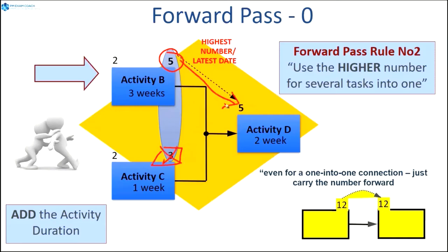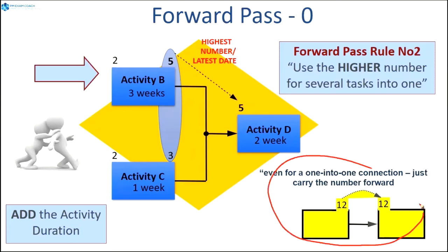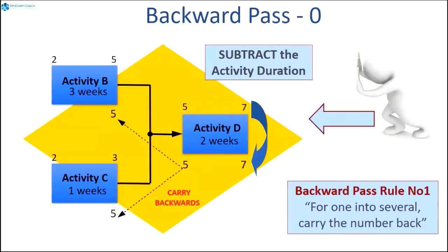And we're going to feed the largest number forward to be the early start of the subsequent activity. Even for a 1-to-1, you'll just carry the number forward.